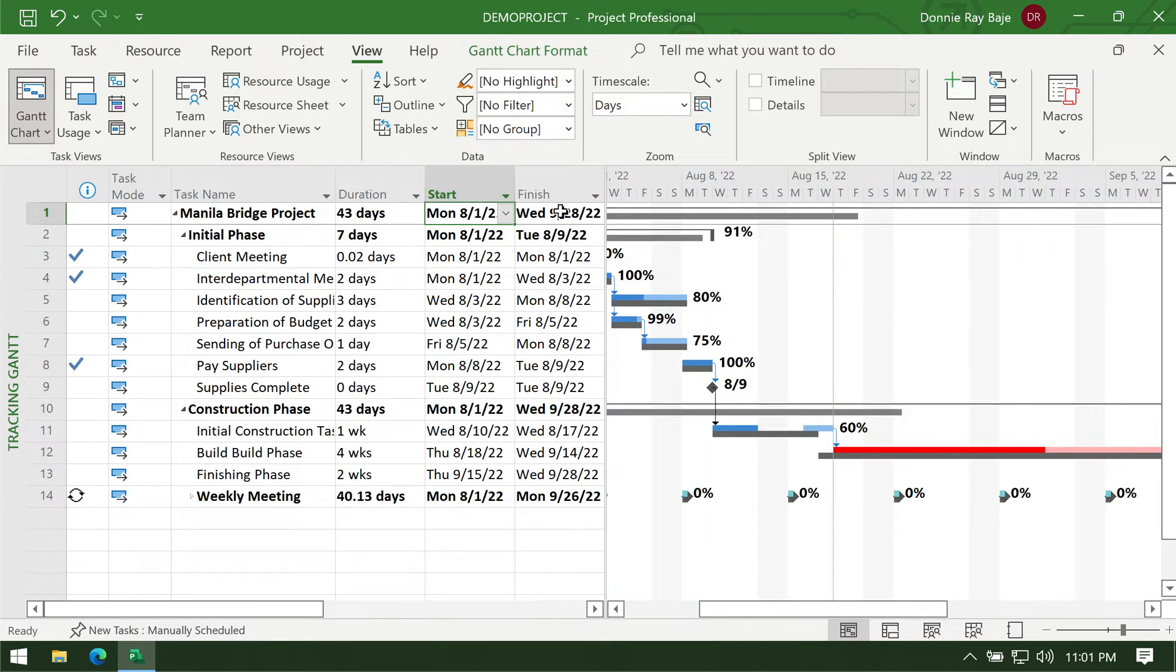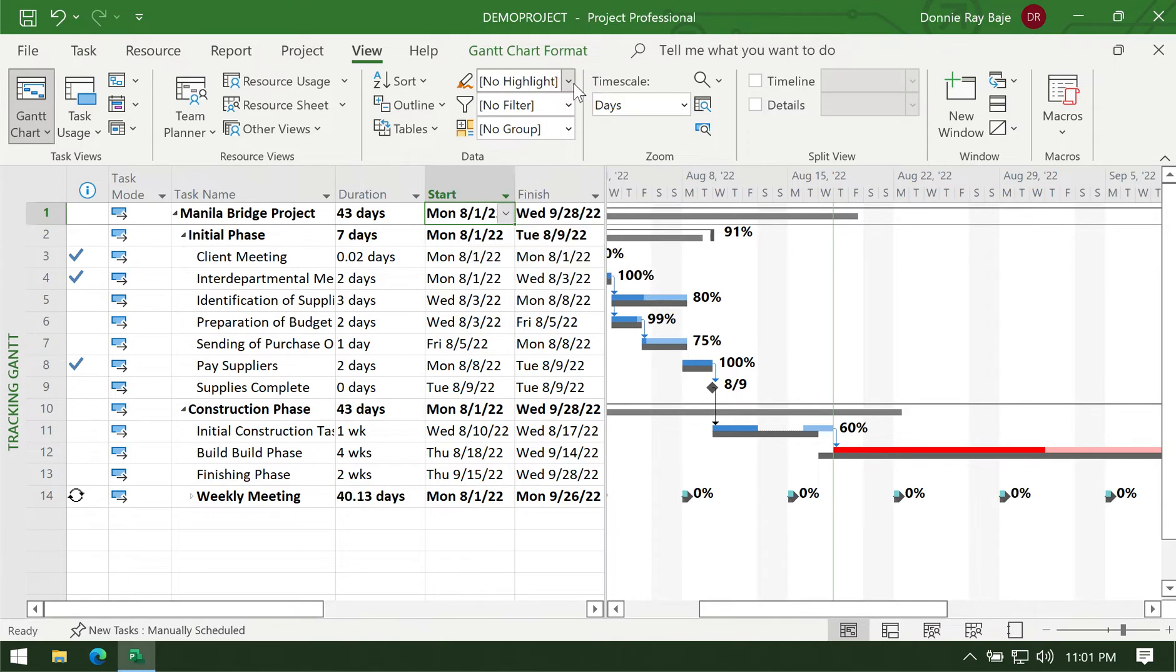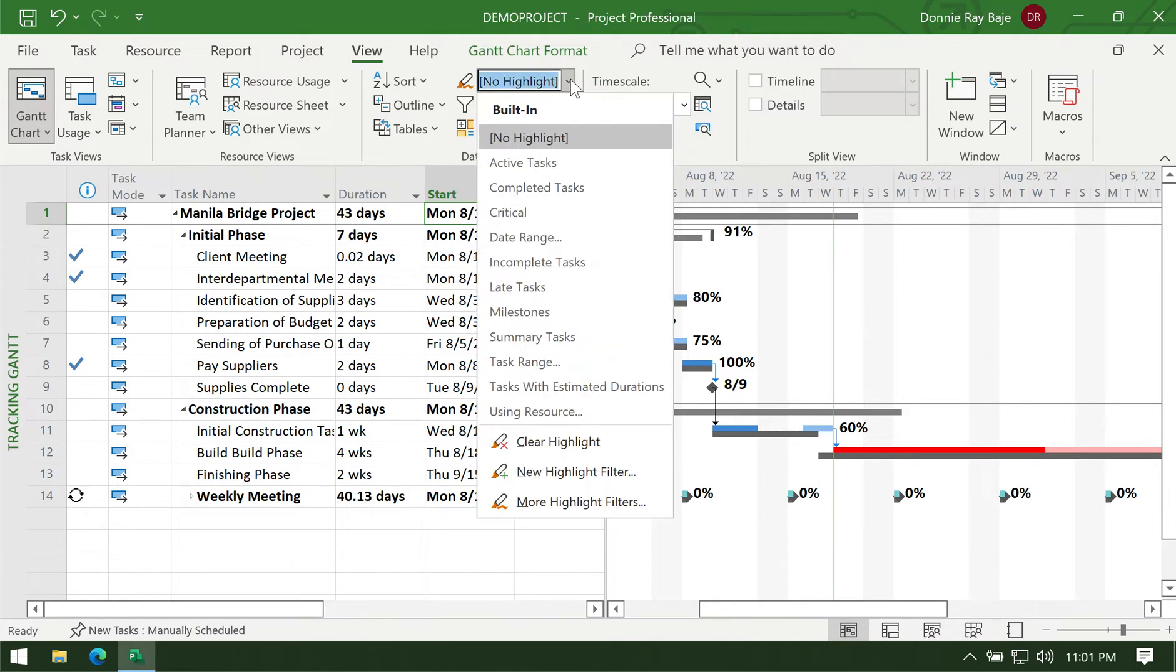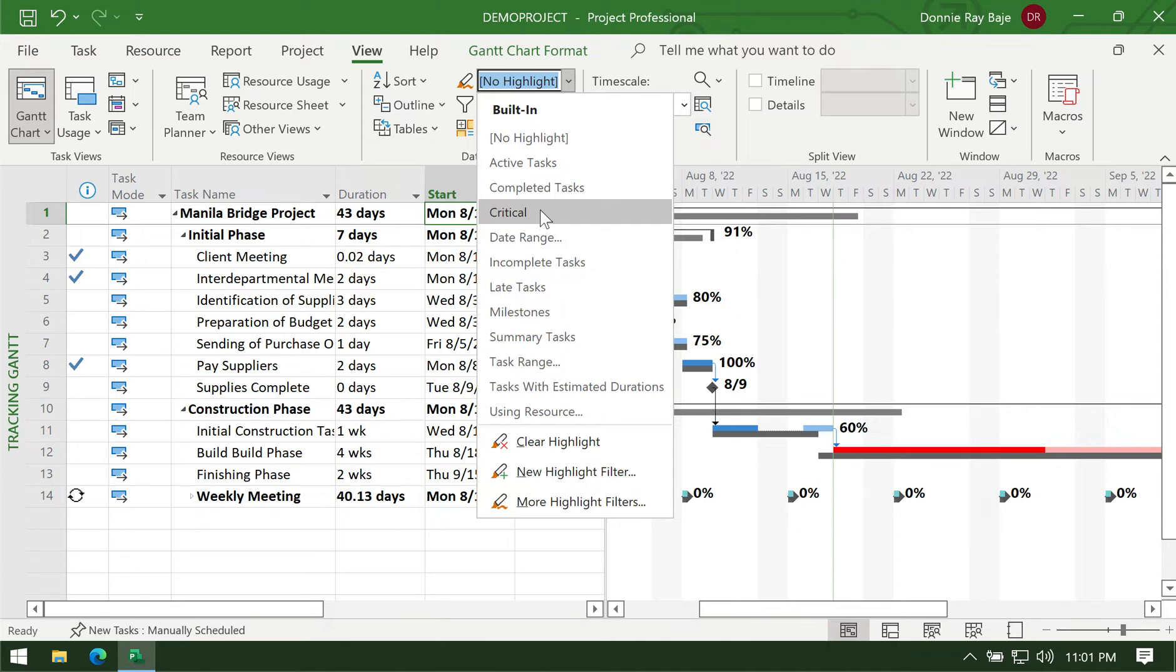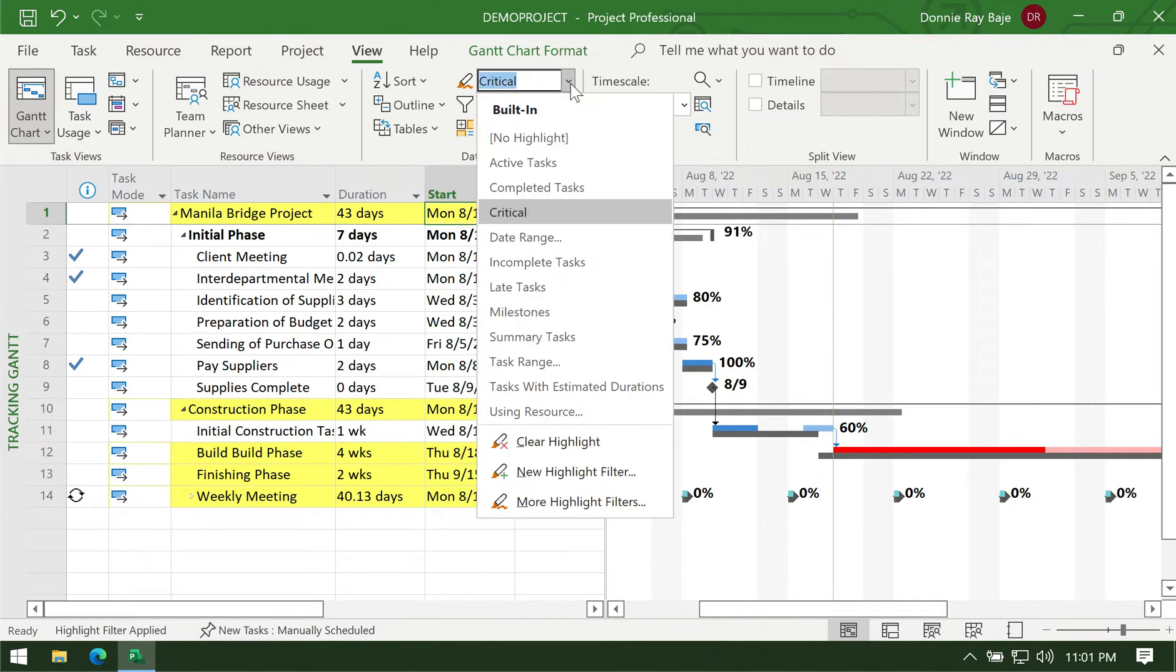Another option is not filter but just to highlight. It's almost the same as filter except that it doesn't hide those that don't satisfy the condition you are highlighting. For example, I want to highlight the critical tasks. Filter would just show it to you and remove all the non-critical tasks, but highlight will just highlight them.